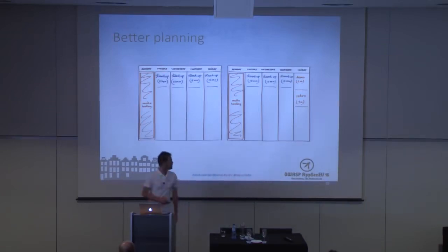We had some problems though, because if you are closing your sprint here, then the first opportunity to look at everything they built here is here, which is too late. So we had to shift some of the days to the end of their sprints, but this was working pretty well.